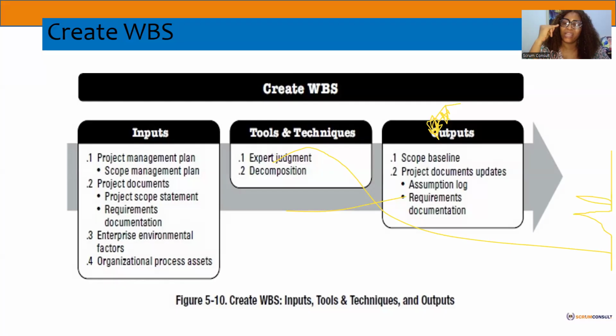For instance, if it was a cost change, a change in the budget, you have to assess the impact that cost will cause on the scope and even on the timeline. If it was scope, you need to assess the impact as a project manager. You need to come up with alternatives, with a solution.